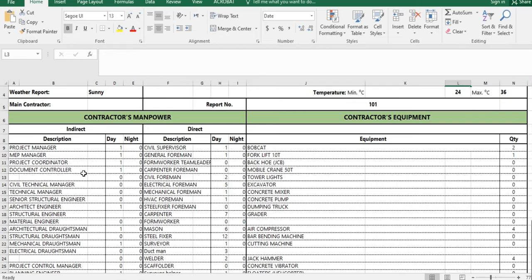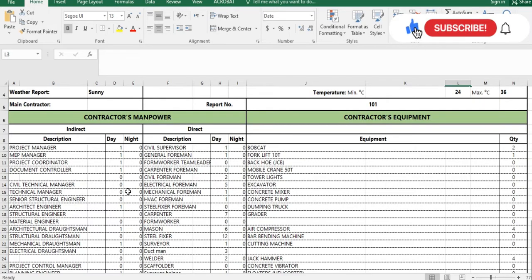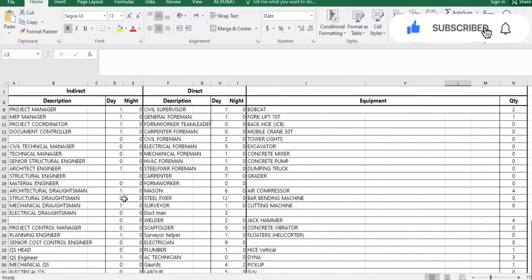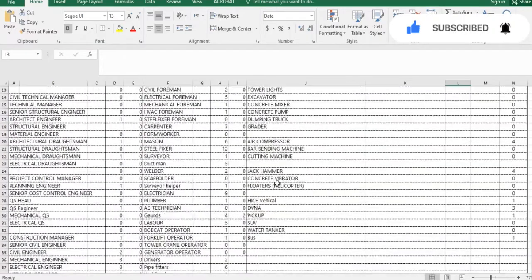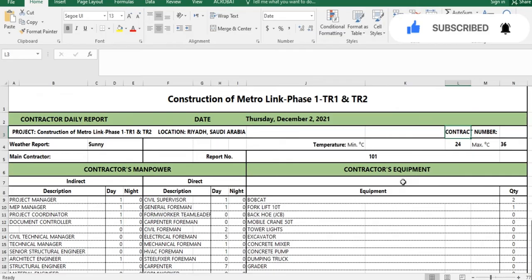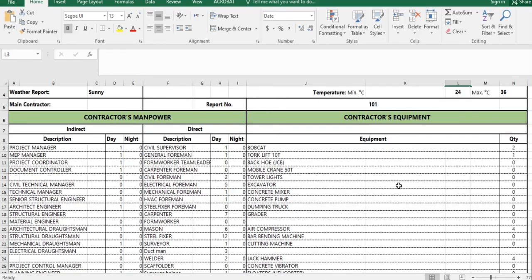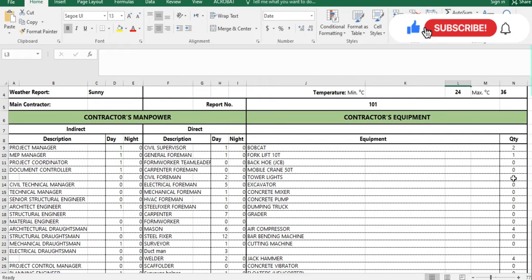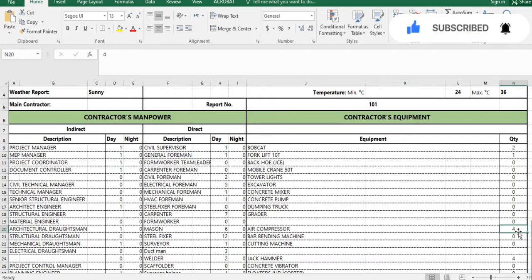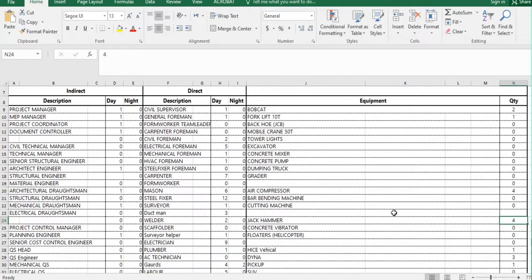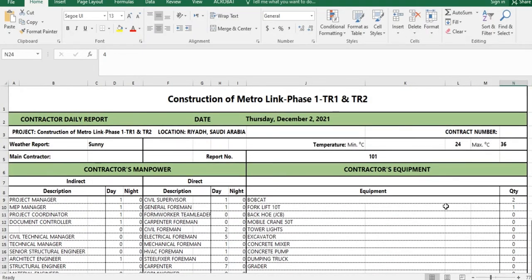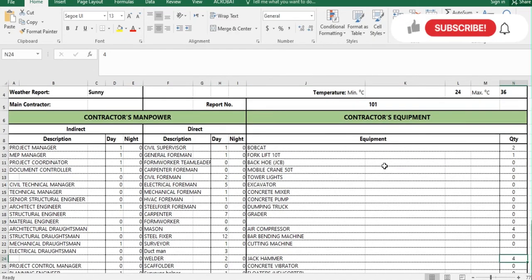You get the data from the site admin or timekeeper and update this section accordingly. The second portion is about the contractor's equipment — what kind of equipment you are using at site and how many in numbers. For example, two bobcats, one forklift, air compressors, jack hammers. You get this data from the logistics team, who provide it on a daily basis.